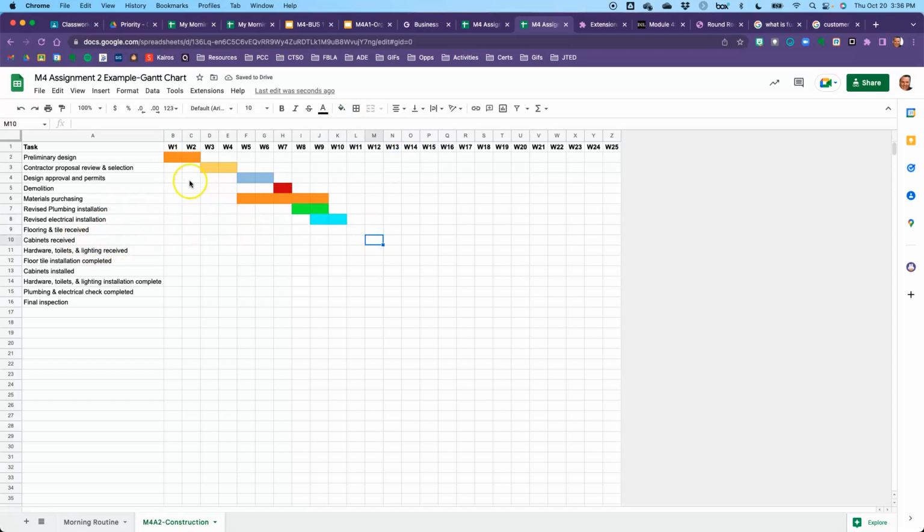Anyway, this is what you're going to do. You're going to map out each one of these tasks on a timeline that you think is reasonable. And again, whether you say 1 week and your friend says 3 weeks, it doesn't matter. What I want to see is this kind of progression, this task dependency. I can do this while I do other things. I can't do anything till this. And just get a sense of what it's like to lay out a major project. Right? And so that's a Gantt chart. So I'm going to provide this template, or you can use the software tool that they provide in the lesson. But it's simpler and quicker if you just do it this way so you can get it done.